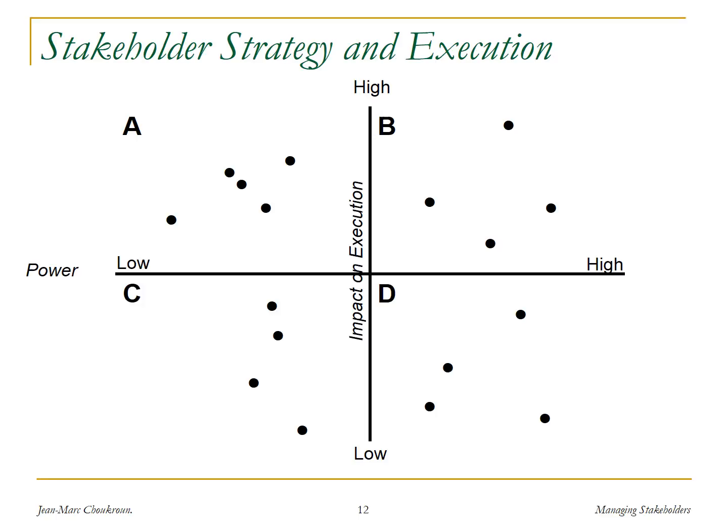So when they went to inquire, they found that the people in charge of the implementation were the nurses, as is the case for most things in a hospital. And the nurses had very little input in developing the new procedures. So when they tried to apply them, they found that they were totally impractical. So that was an example of people on the bottom right.